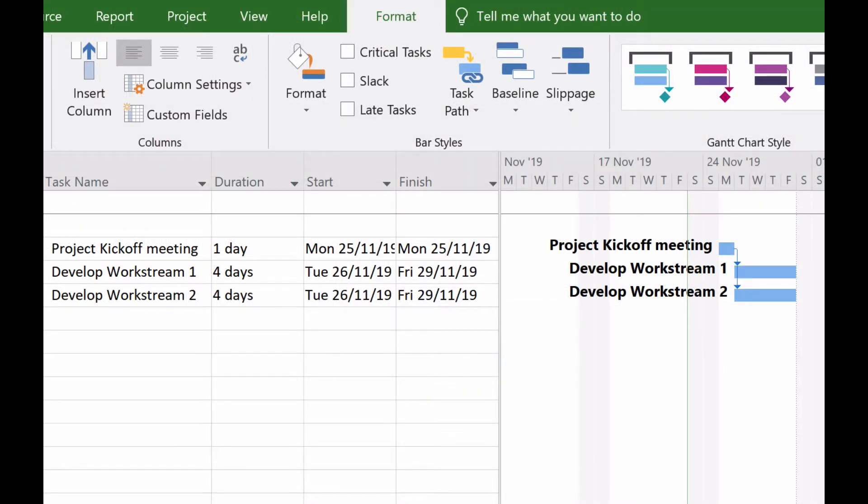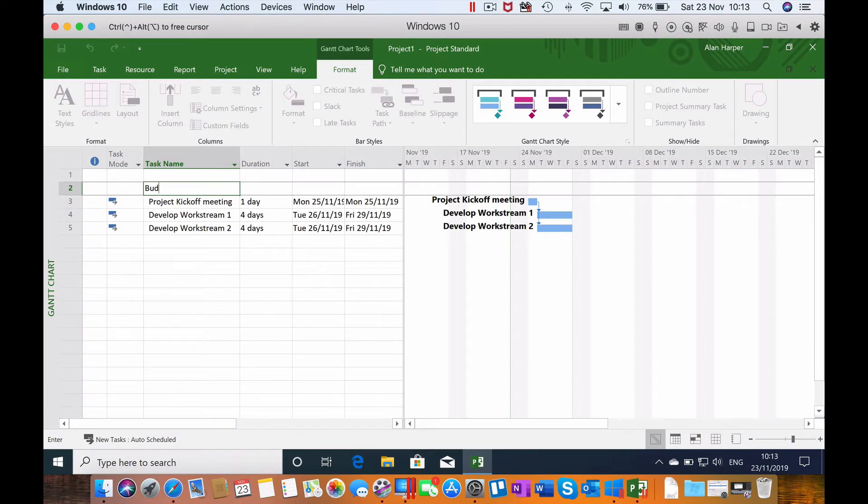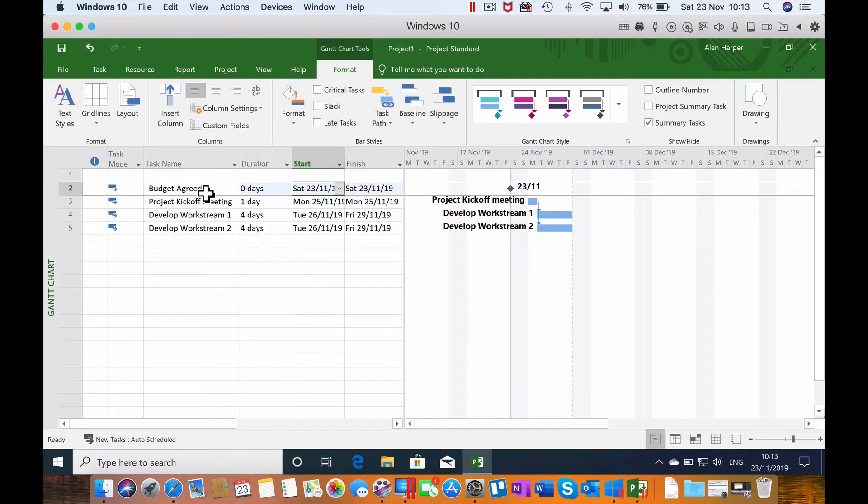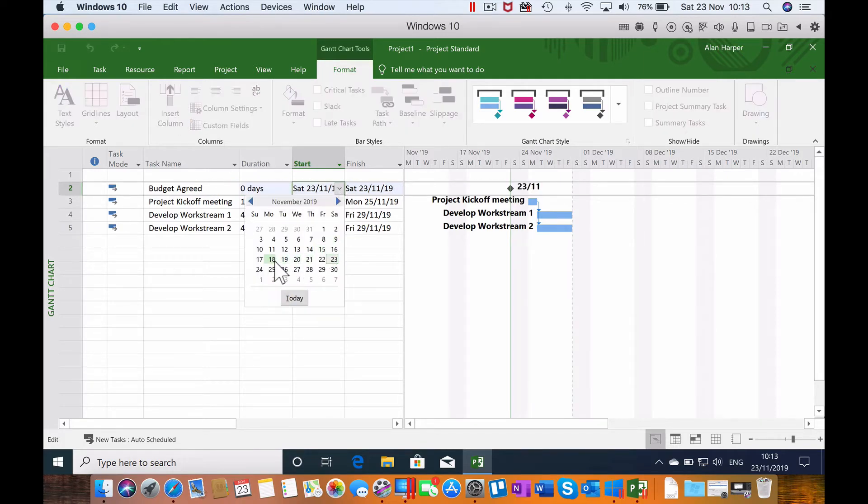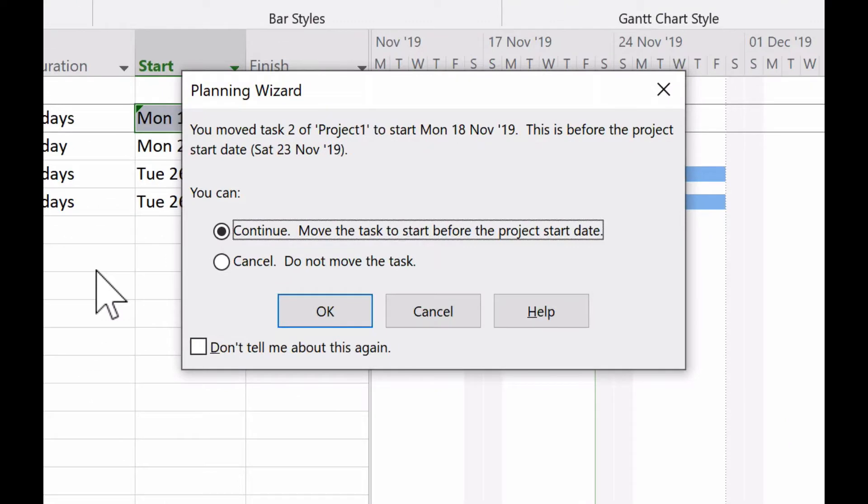So let's look at this example project plan designed in Microsoft Project. We have a project kickoff meeting, two work streams coming out of that meeting to develop their plans. I designed this plan on Saturday the 23rd of November, so as far as Project is concerned, that's the project start date. If I add a milestone that was before that date, such as project budget agreed, Microsoft Project tells us that we've tried to insert a date before the project start date, the 23rd of November.